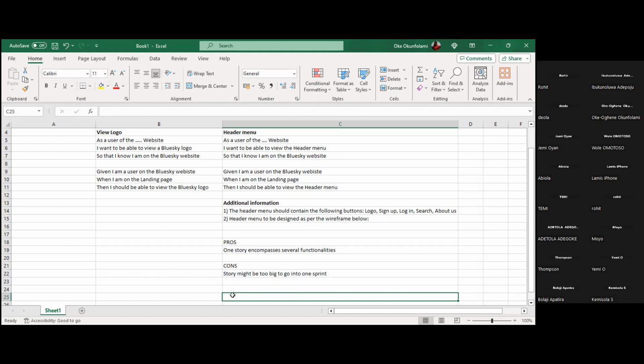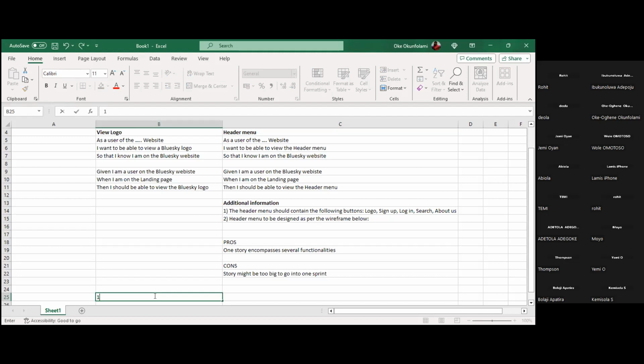When a story, I don't know if they've taught people about estimation. We are estimating, and you have 1, 2, 3. So you just keep adding the previous number. There was 1 and there was 2. If you add 1 plus 2, you get 3. If you add 3 plus 2, you get 5. If you add 5 plus 3, you get 8. This is called the Fibonacci sequence.